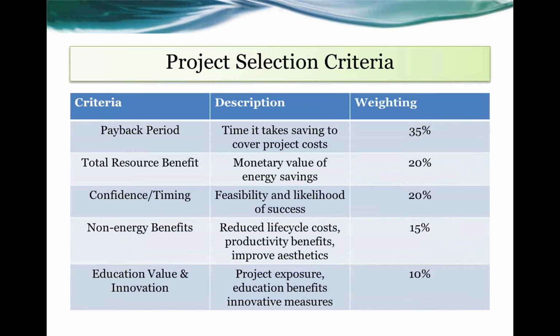So moving along, once you get past that screening part, we have a good group of projects. Since we're limited with that 500,000, it goes quick. We really have to pick the best projects to fund with the limited funds we have. Really the biggest thing is back to that payback period. We have it at about 35% of the weight, just because we want to make sure that these projects can pay for themselves over a 3 or 4 year period, and also pay back the funds so we continue to do more projects. And we think that payback period will help the smaller sized projects.